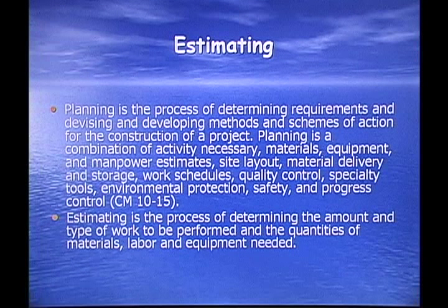Estimating. Planning is the process of determining requirements and devising and developing methods and schemes of action for the construction of a project. Planning is a combination of necessary activities: materials, equipment and manpower estimates, site layout, material delivery and storage, work schedules, quality control, specialty tools, environmental protection, safety, and progress control. Estimating is the process of determining the amount and type of work to be performed and the quantities of the materials, labor, and equipment needed to do the job.